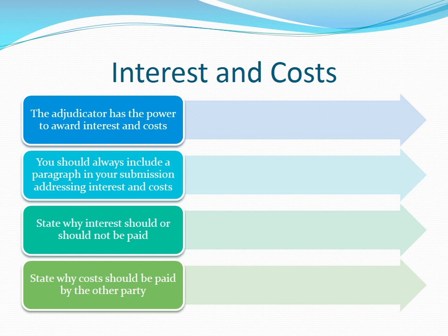Generally, under security of payment legislation, interest is payable on payment claims from when they are due and payable and remain unpaid. Interest is calculated according to the contract or the security of payment legislation. You should be aware of the specific provisions of your contract and the security of payment legislation in this matter. Often, a generic statement in the submission or response will suffice. This is dealt with in more detail later in the course.